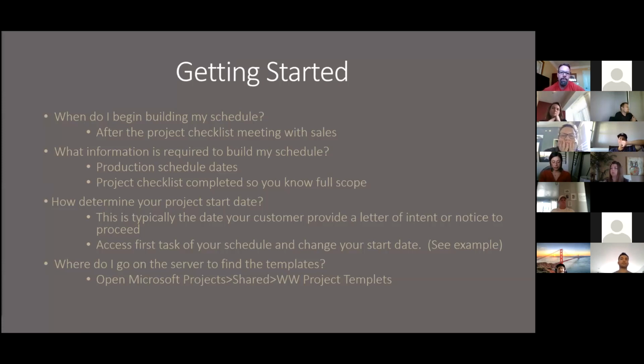What information is required to build a schedule? You'll need your production schedule dates from the production schedule I just showed. You need a project checklist completed and know your full scope. How do I determine the project start date? This is typically the date your customer provides in a letter of intent or notice to proceed. I'll show you that in a second when I go over the schedule.